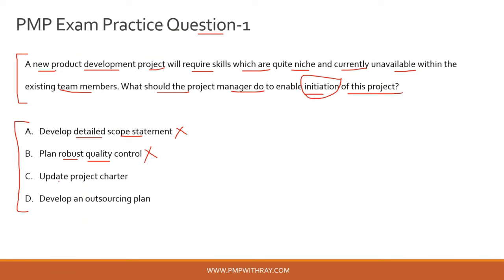Option C: update the project charter. This is probably the right answer because updating or creating the project charter and reviewing it with your sponsor happens in the initiation stage of the project. Option D: develop an outsourcing plan — essentially a procurement plan — which is developed in the planning stage, not in initiation. So option D is also incorrect. The correct answer to this question is option C.